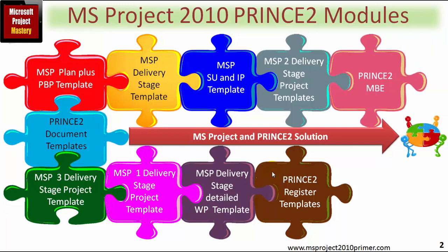One of the strengths of Prince2 is the fact that it has management by exception, and you would not normally want to use this, of course, unless tolerance was forecast to be exceeded. So you pretty much need a plug-in, if you will, for management by exception should you ever need it within your project. Much like a subroutine, if you will. Well, I've got you covered. I've included a template for management by exception as well.